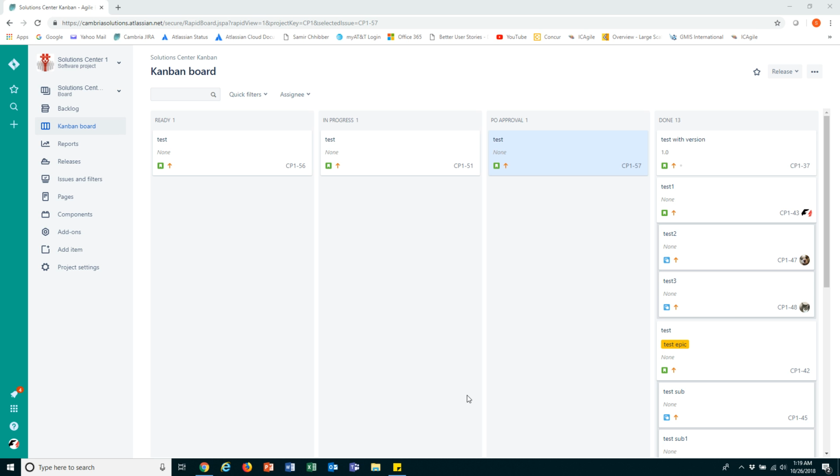It also requires us to shift our thinking a little bit. And that is the items on the right have the greatest value to us. Why? Because they have the greatest investment in time. They are also the closest to the finish line, and therefore can be delivered to the customer or whatever the case may be. The stories on the right will always have more value than the stories on the left because of their investment.